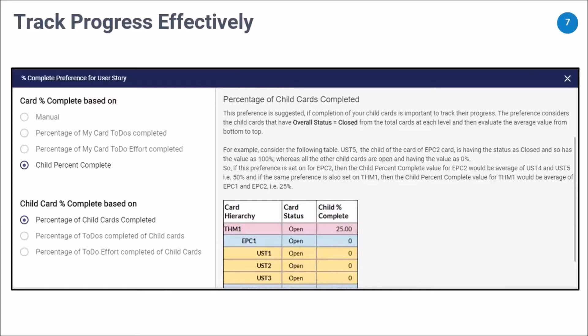If you want free-hand control over how to update the progress, we have also provided a manual option. This option allows you to track the card's percent complete as well as the child card's percent complete independently. For example, you may want your theme's percent progress updated manually, but as a reference, you'd like to know how many epics have been completed. So child percent complete is based on child cards completed, while you have the final say on how much work is conveyed as completed for that theme.